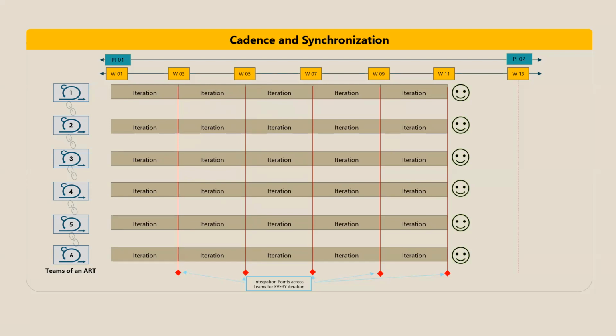If there is no cadence and no synchronization, you are just like the waterfall model, thinking that everything is fine. You just have false feasibility. Also, if one team is dragging or not able to integrate, you don't know if the rest of the product is correct or not, because maybe this is right and the rest of the teams are wrong. So synchronization and cadence are really important because they give you chances to integrate the work products together. Now let's look at the negative side of it.